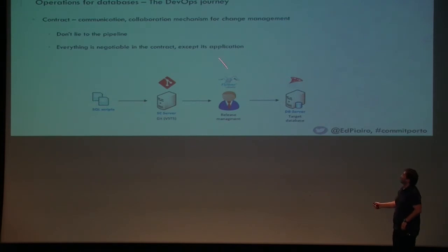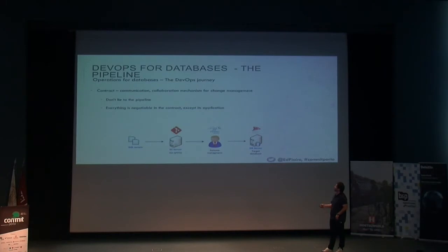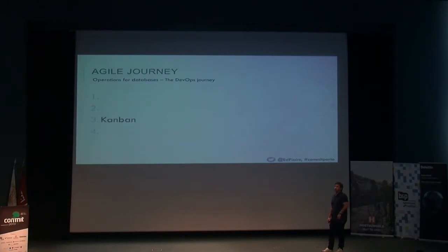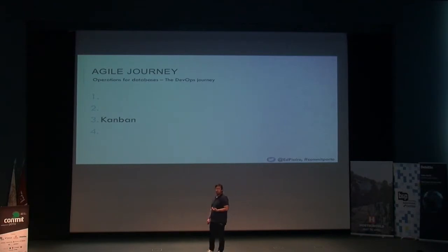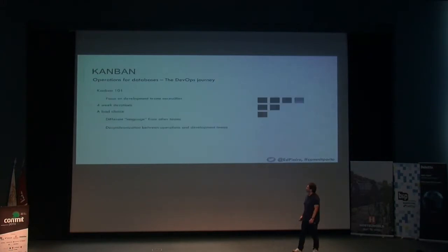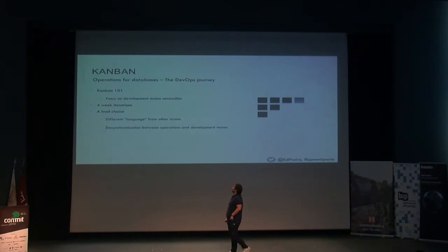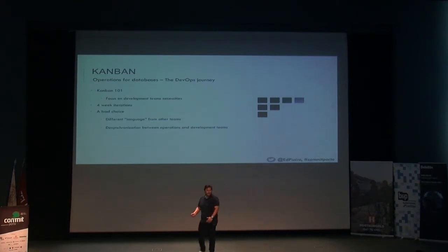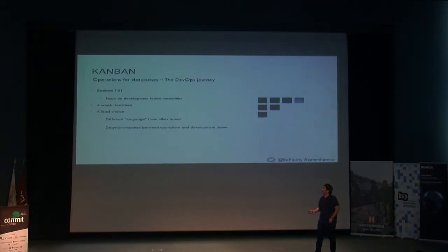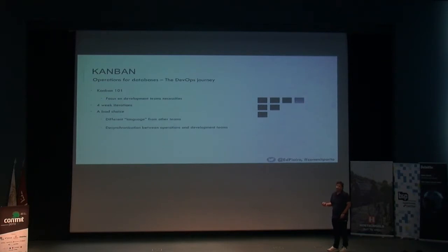So as you see, we started to build the first block — source control for the migrations, the database changes. And then that feeling of: we are an operations team. Scrum shouldn't be for us. Why do we need a sprint goal? Why are we reacting? We're supposed to react. So let's do Kanban. And we failed it miserably. Why? Because Kanban doesn't even have iterations. Why in hell did we think Kanban had iterations? It was a big mistake. And don't forget, this is a learning journey. At that time, we thought we should have iterations on Kanban.